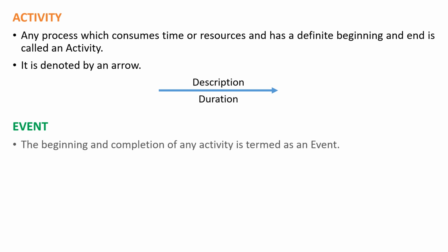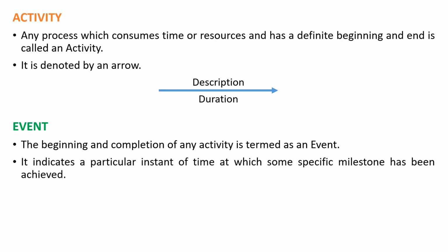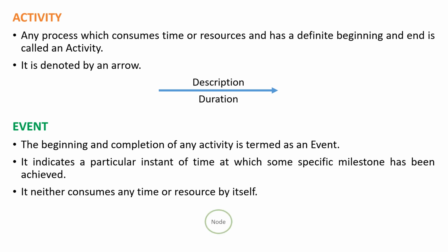Event: the beginning and completion of any activity is termed as an event. It indicates a particular instant of time at which some specific milestone has been achieved. An event neither consumes any time or resource by itself. An event is denoted by a node.